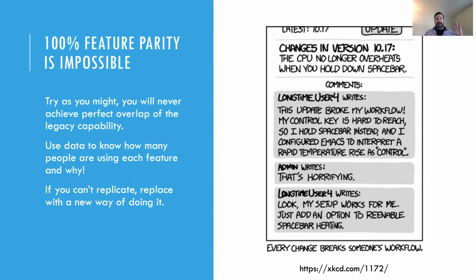Sometimes you say, well, this is so key, everybody's using it, we can't deprecate it, so now we've got to build it, and how much time is that going to take? And you have to build that into your timeline. Which is why, again, Hello Search is so important, because you discover those things. You discover things about the new search engine that you didn't know before. So you can make these decisions.